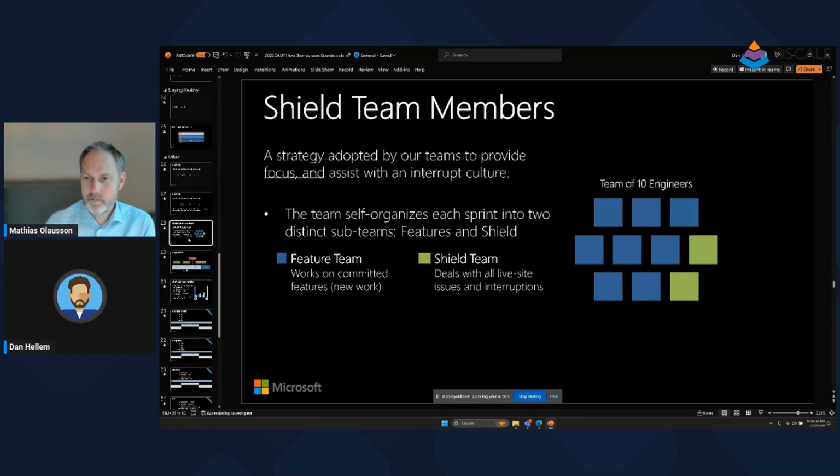the worst case scenario is basically you don't have to work on feature work, and you basically just work on interruptions, and you get a bunch of bugs fixed. And you just do that for a sprint, and then you go jump on a feature team for 4 sprints at a time. So the morale actually jumps way up. Because you're not interrupted, you can focus on work, you can see progress getting done.